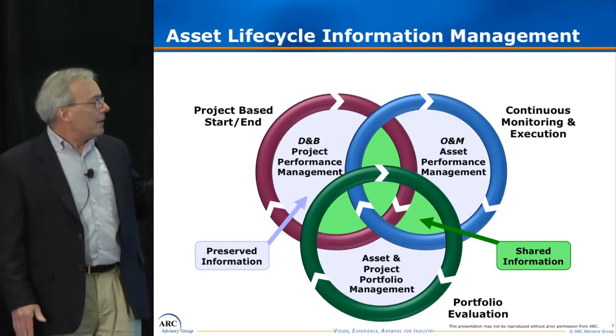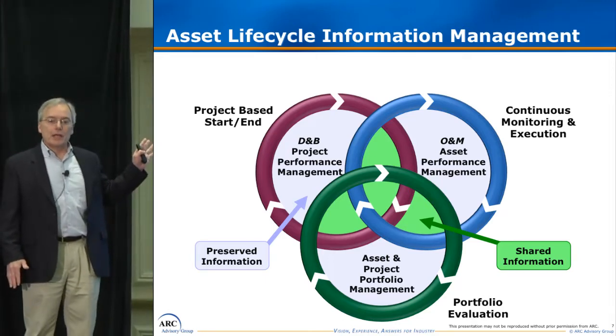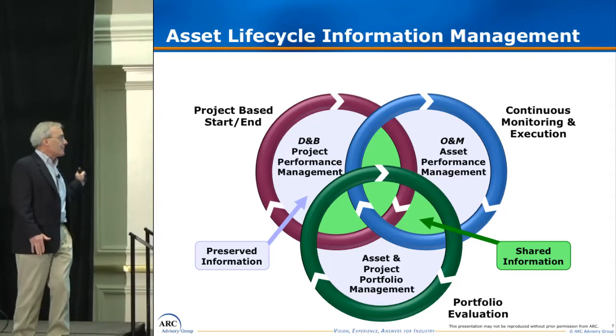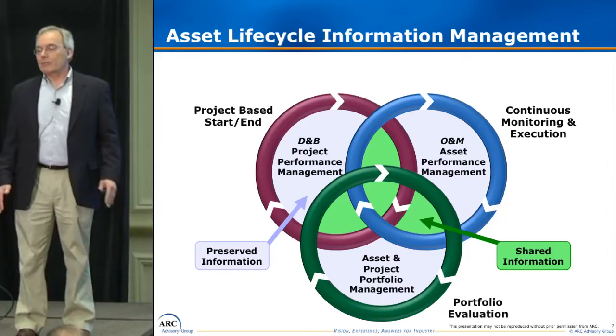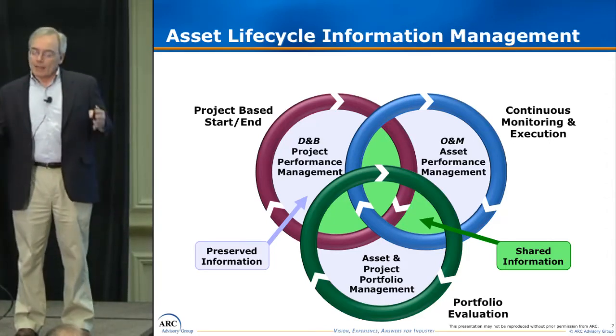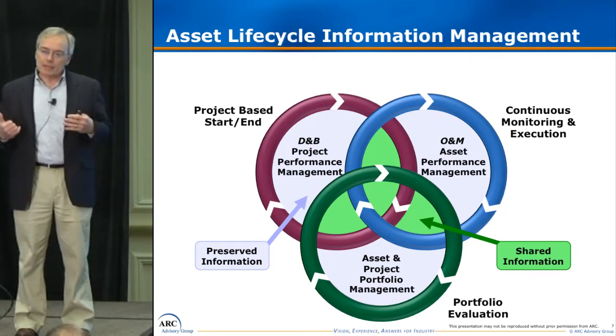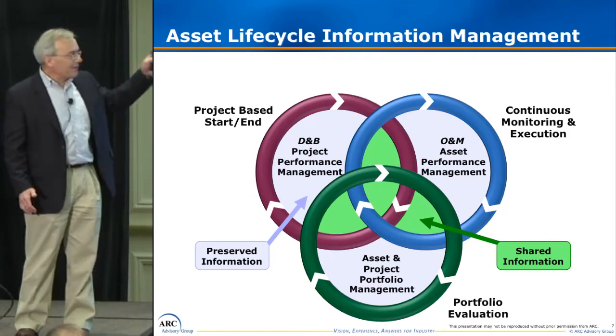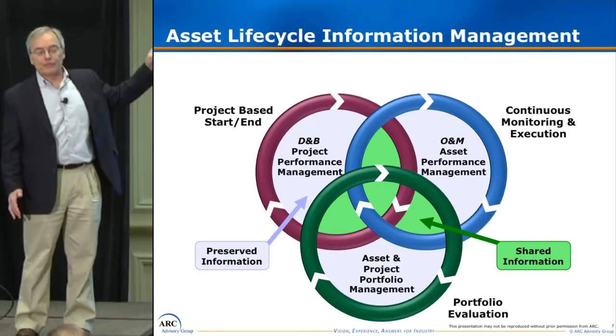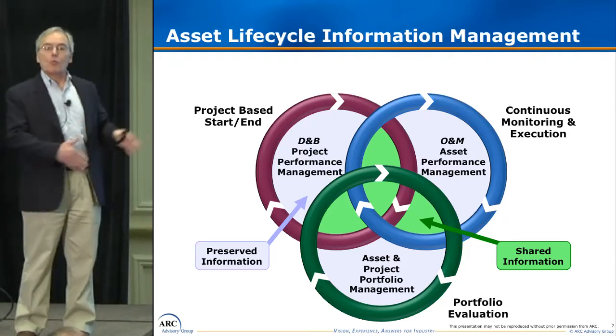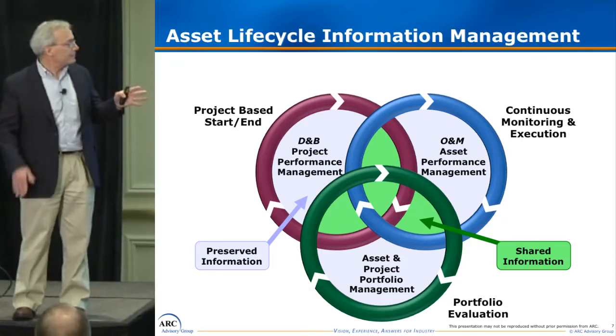So we have this vision that in handover, everything should be transferred over to operate and maintain. And I would suggest that we structure that a little bit differently, that there's some information that needs to be preserved for the next project, like why you chose that particular valve.